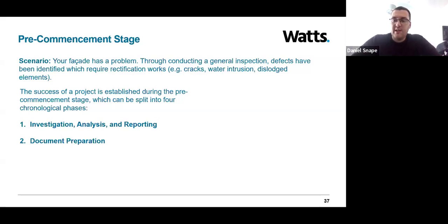So the documentation should be clear in setting out which works have been designed and precisely what the contractor is required to undertake and price. It should identify any areas where a contractor's design portion is required to avoid any misunderstandings.